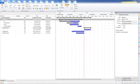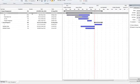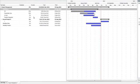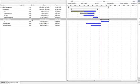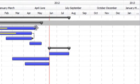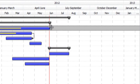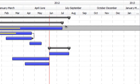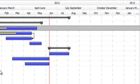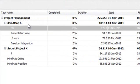You'll notice that the parent branches, so this is the central idea and these are the root branches that have children, become overview tasks. They're encompassing the task below them. So when you change these tasks, you'll see that they move in accordance. That helps you to get an overview of where the start and end for all the tasks inside that grouping are.